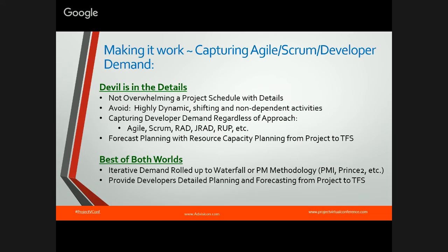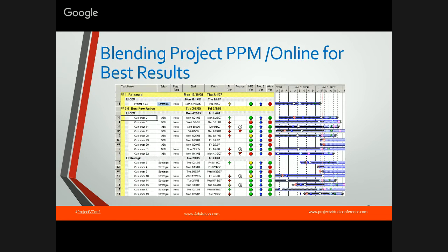Again, the idea is to get the best of both worlds. You're going to see Office 365 Planner, an extremely lightweight tracking tool, together with the scheduling and resource capacity planning of Project, and the connectivity to not just Project, but other third-party applications out there. Here's an example of a schedule where we pushed the customer project and did high-level planning, but rolled all the data down into Visual Studio, allowed the technical teams to work there, and then synchronized the actuals and set a dashboard on it to tell us how we're doing with our estimates and our actuals, and to track and visualize that.